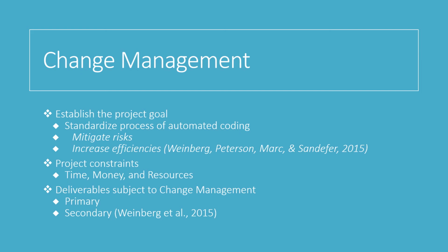Establishing project constraints is also a necessary step. Identifying how much time you have, what are your timelines, what are your hard stops, etc. How much money are we budgeted, and how long do we have vendor resources after go live. As mentioned in previous slides, we've already set our budget and our go live date. Then we need to determine our minimum quality threshold to be about 99% coding accuracy, and then took into consideration that there are 3 major holidays approaching that will take time and resources away from this project.